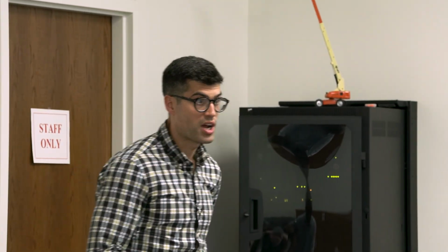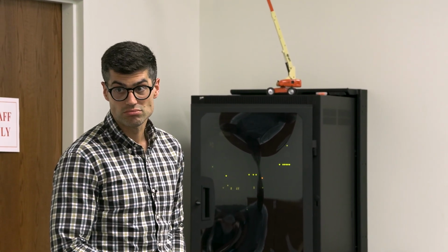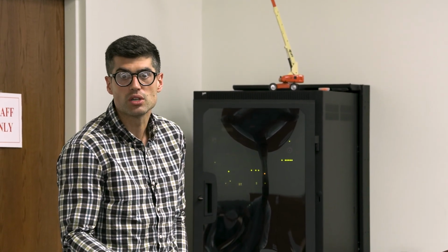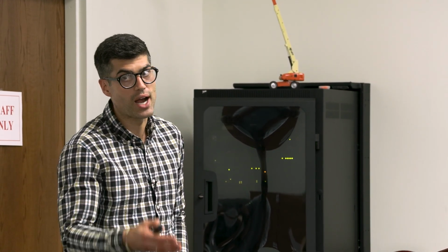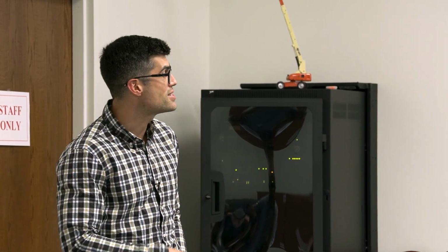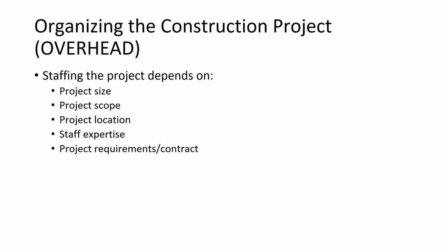Hey, it's a big warehouse. We don't need as many people. Big Amazon type tilt-in-place, cast-in-place, whatever it may be, I might need fewer people because it's less complex. Then I've worked on projects like the Cleveland Foundation, which is dowel laminated timber, which is very complex, has a bunch of nuances, small building, high level of complexity. So you've got to have that understanding because that's going to help us determine our allocation of this overhead.